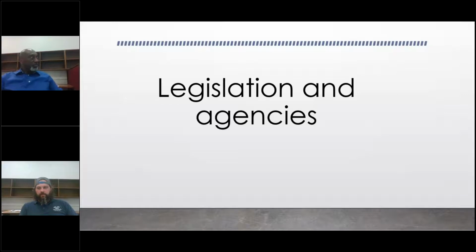Yeah, a lot of entities out there have liquidated damages and related things to the scheduling. For me personally, I'm sure some of you are seeing it as well, with material lead times and material availability these days, especially this summer and spring and everything going on with COVID. My standard metal building lead time that should be 4 to 6 weeks is more like 4 to 6 months right now. And some of these contracts that we see, I haven't had any lately, but we've seen them in the past, where they have liquidated damages, and you want to make sure that you redline that stuff and have the conversation about it before you sign off on the contract and send that in to your customers.